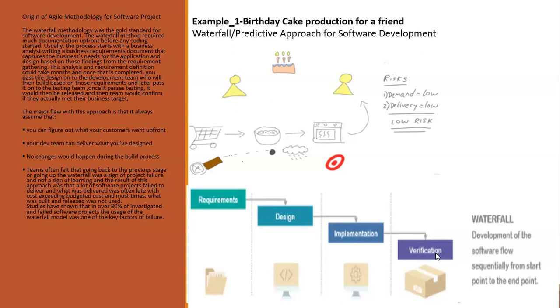And when you get to the final stage, let's say this is the final stage, you've passed through implementation, design, and all that, and you get to the final stage to discover that this thing that we built is actually missing a component, and maybe it happened at the design stage, right? So that is to say we have to do a great rework by going back to the earlier stage to make that correction. And of course, here, if you're using the waterfall approach, a lot of things happen.